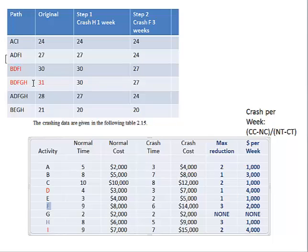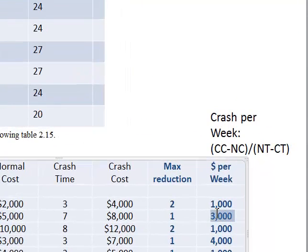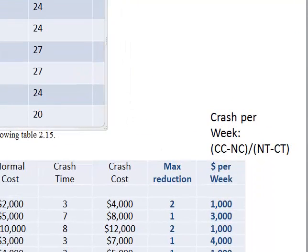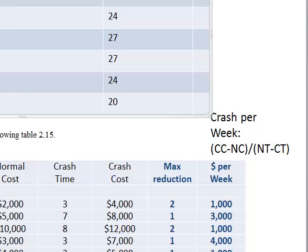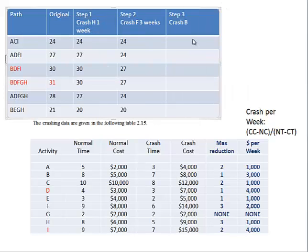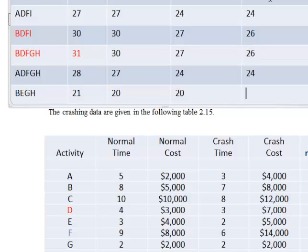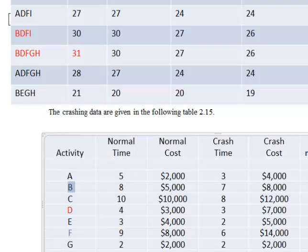Next: F is already crashed, D is not available, H is already crashed, but B is common in both critical paths, so let's crash B. B is $3,000 per week, which is under the $3,500 threshold, so that's acceptable. Crash B for one week — wherever you see a B in the paths, reduce it by one week.